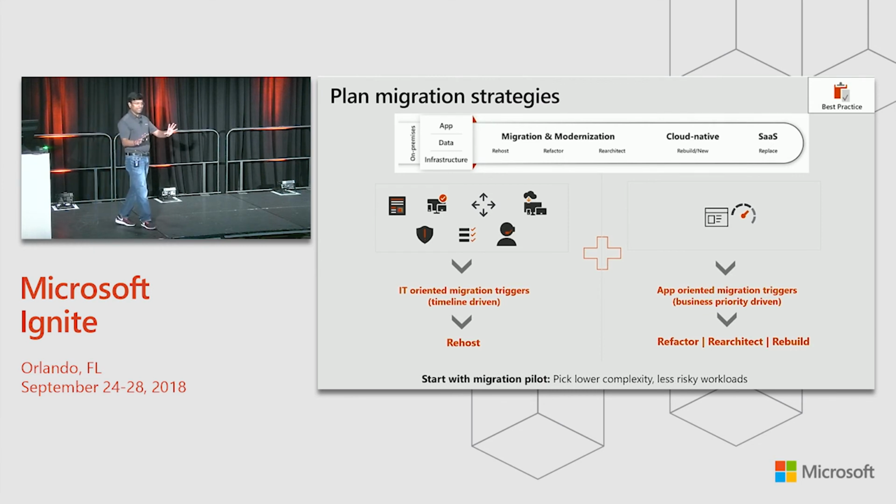The reality is that both of these strategies happen at once. Almost every customer that we speak to does both of these. So it's not like an all or nothing or one or the other. It's both. And so for a migration pilot, which we again recommend, I think Dan was going there as well, pick a basket of workloads which are representative across all the strategies, right?